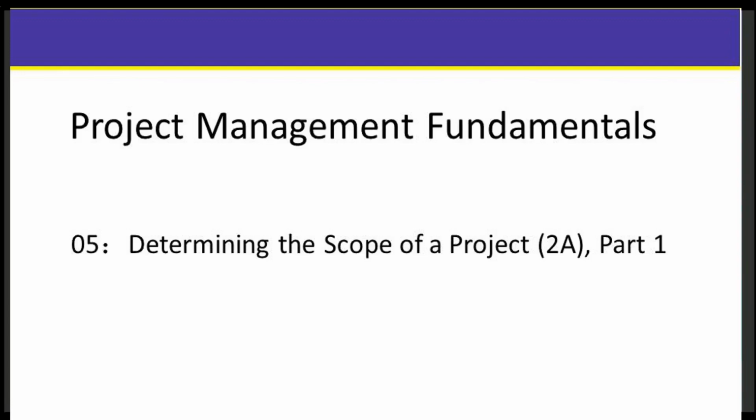Okay, Christina, so now I kind of understand what a project manager is, but how do we actually start a project? Okay, well, the beginning starts with a charter. So a charter is a document that is broad enough to where it doesn't change over the life of the project. So it's not super detailed. We'll get to the details later, but we've got to start kind of big and make sure that we get the general idea documented. Typically, a charter is issued by the sponsor.